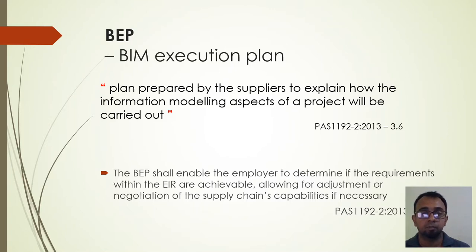It is a requirement of the contract, but at the stage of bidding, it helps the employer to evaluate if the EIR requirements can be fulfilled by the proposed plan of the bidder. And also it can be used to negotiate for any adjustments that are necessary.